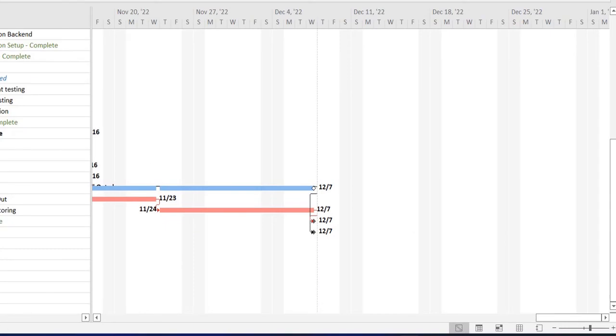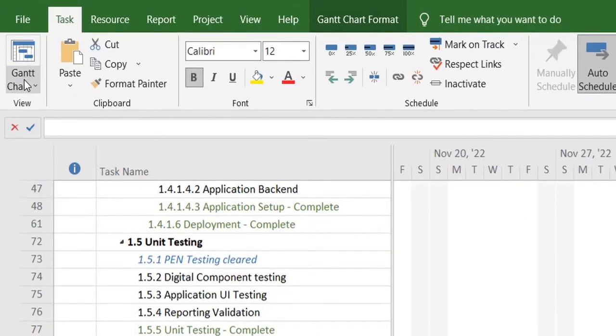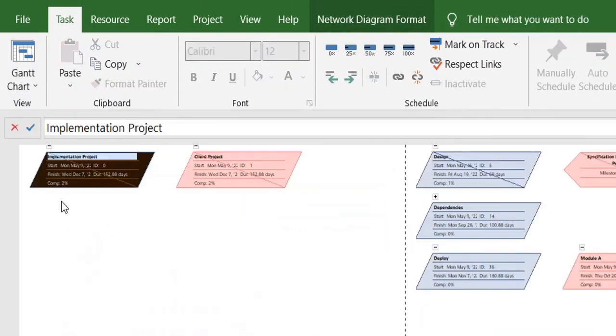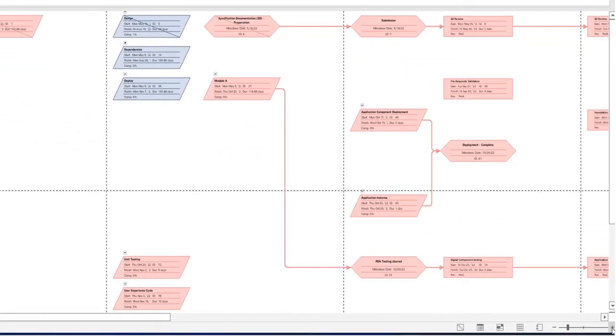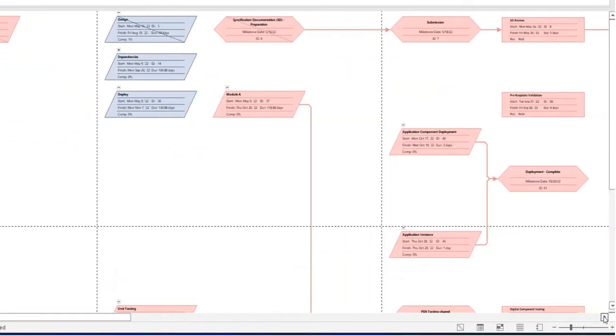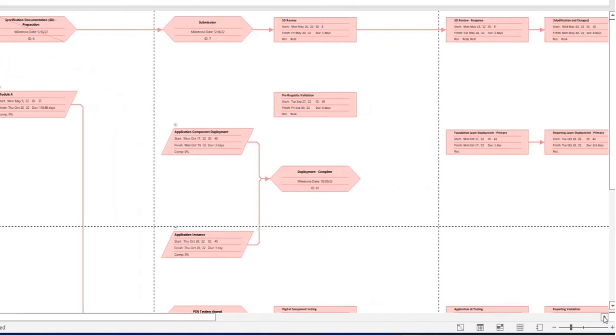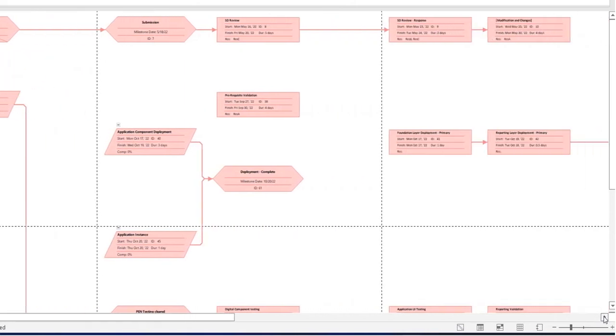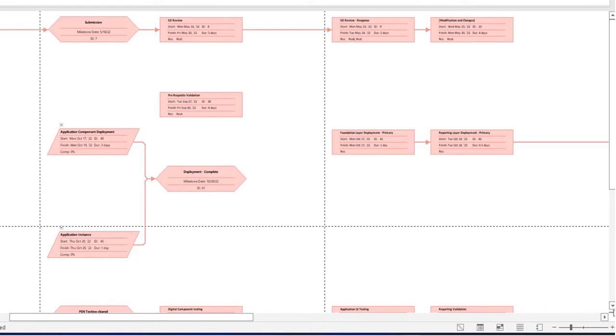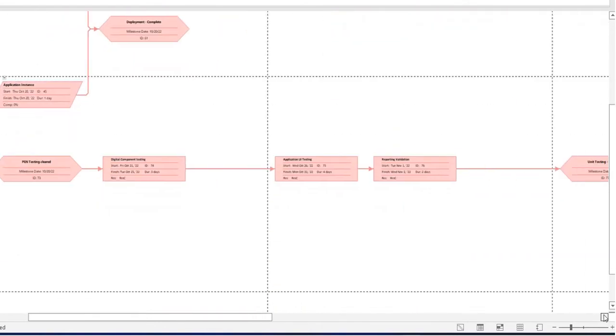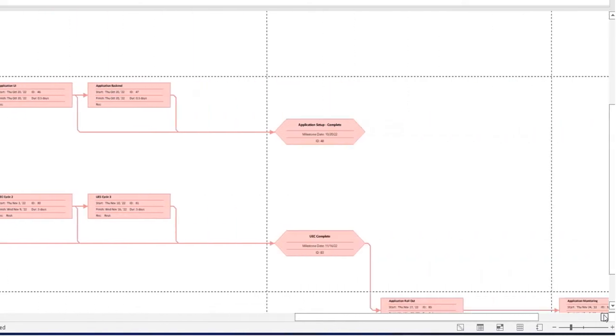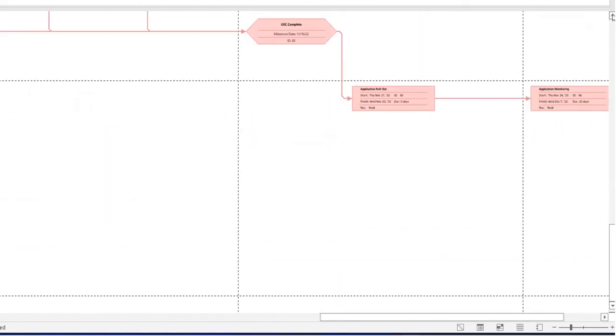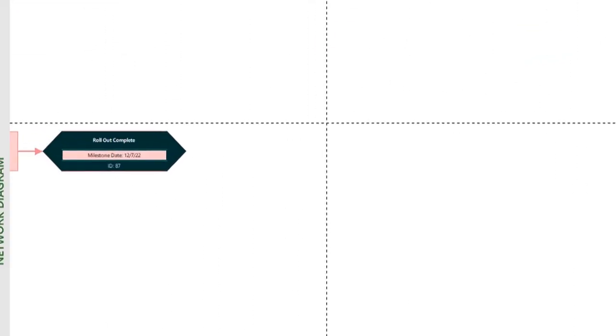Now there's another way of viewing this. You can head over to the main task toolbar and select network diagram. This gives you an even better view of your critical path. Over here you see by default all the filtered critical path line items are shown to you, so you can follow the entire critical path of your project right all the way to the end of the project.